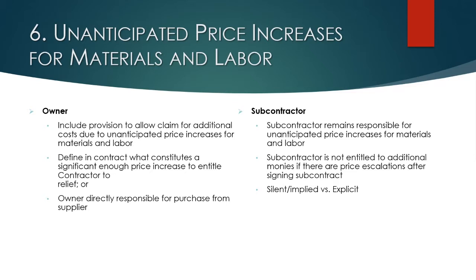However, in today's environment, that could lead to arguments during the project, and you can avoid those. You head them off at the pass by explicitly and directly addressing price increases in your subcontract, and make it clear that the sub is at risk and is not entitled to a change order for increases.